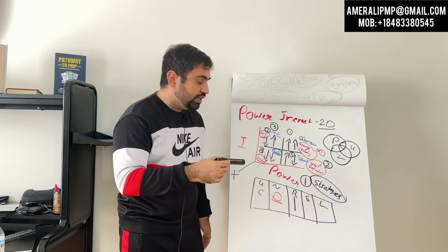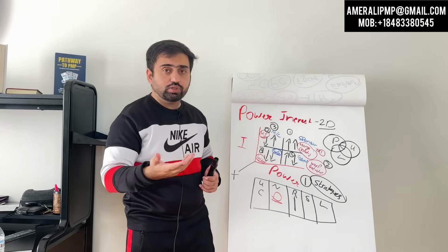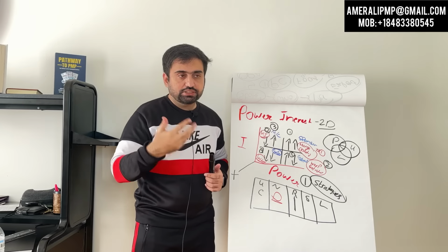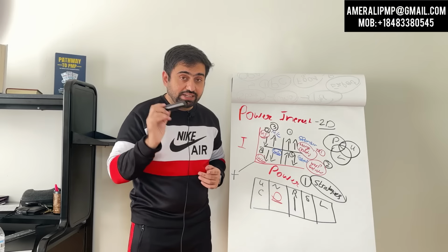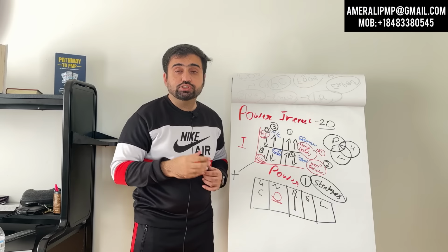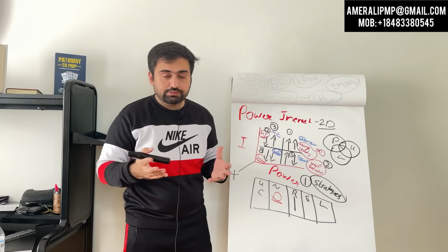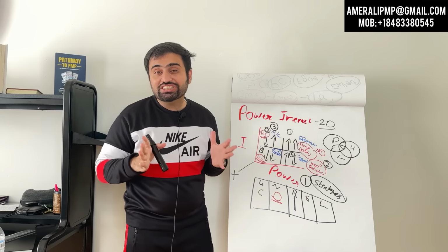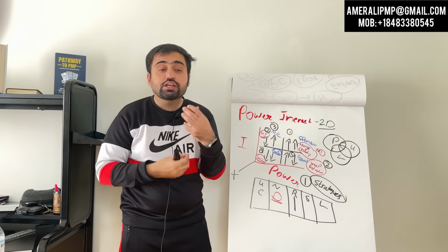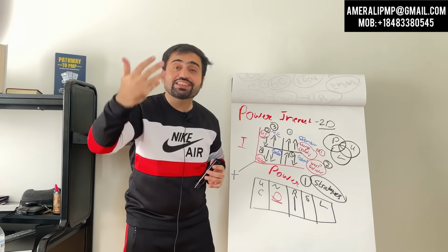We need to do that. So we make all the strategies into it. We look at all the strategies and work on them. And once the stakeholder engagement plan is ready, we give it to the sponsor. The sponsor will approve the plan. Once the plan is approved, you cannot change the plan. If you want to change a plan, you need to raise a change request and then the plan will be updated.